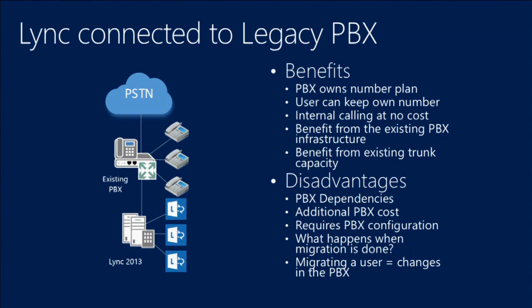And that might mean that you have to invest now in your PBX. So if you want to migrate away from the PBX, now you need to make a new investment into the PBX to make that work. Doesn't sound like the best idea. Additionally, the PBX will be always in the call path. It will be always there. So eventually, if you have moved all the users from the PBX to Link, the PBX is still there. And then you need to change your configuration, and then you need to remove the PBX, which might be some additional effort.